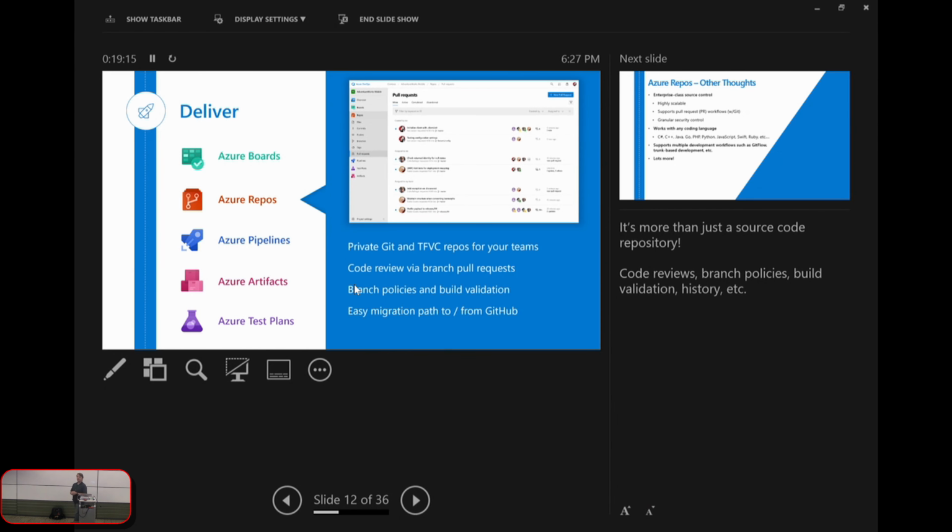So I mentioned the process templates a few times. In those process templates, that's where you define what those work items look like, like a PBI or a user story or a bug or whatever. But as part of setting that up, for example, you have to say, okay, it has all of these fields, and here's the locations of everything. As part of that, it has state transitions in there and what's allowed and what isn't. Because if you try something that's not specifically stated as, yes, you can go from new to activated or active, like from new to closed, well, it wouldn't allow that if you have to go to activated first. Does that answer your question?